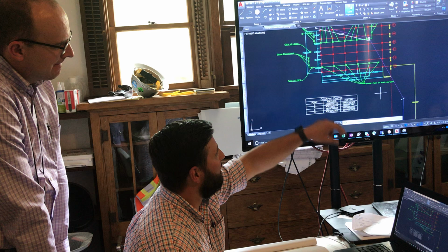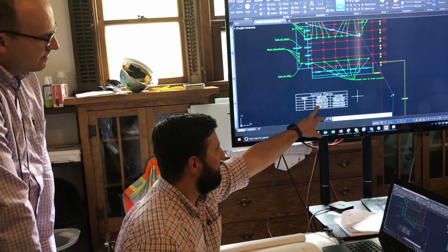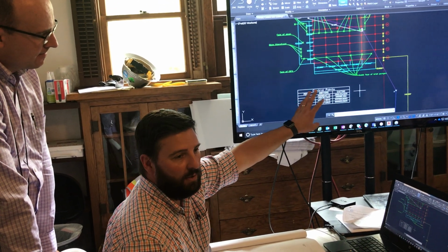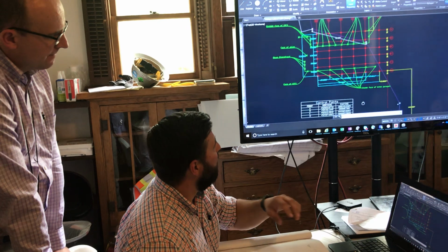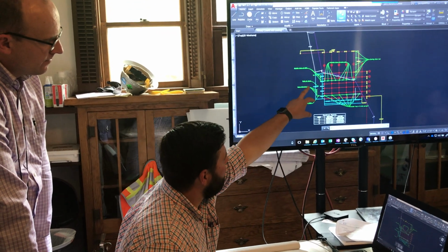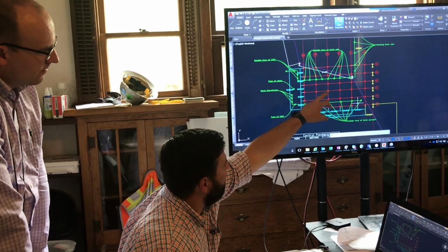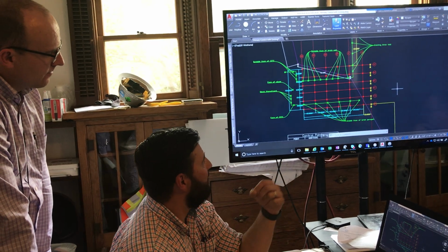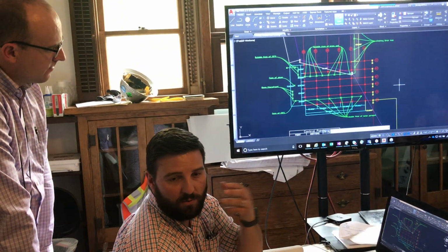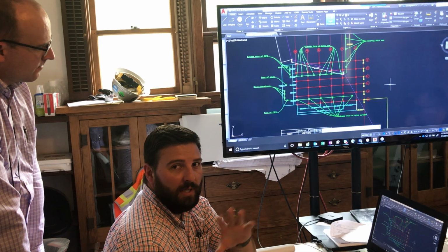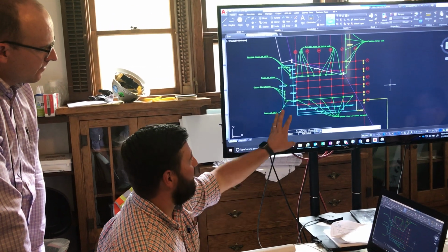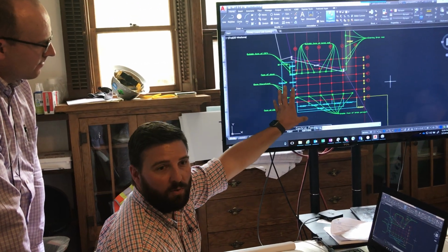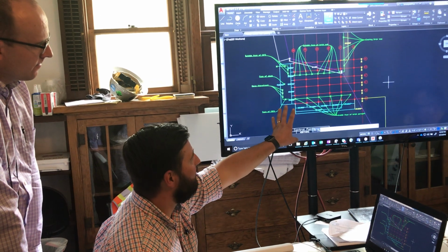So in putting these points in there and measuring everything off, we got essentially the same thing, if you were able to round up a little bit more. The green lines that you see here and here are the outside face of our existing building that was sent over to the engineers for approval. They were able to tell us, yes, where our control points are, where we're going to lay out the building is going to be correct.